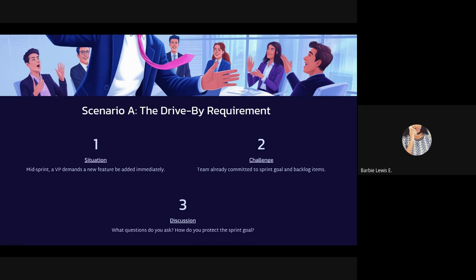One thing I like to do is maybe give them homework as well and say, okay, can you prepare some documentation as to why we're doing this? Or I send them a form that I created myself, a feature request change form. Can you fill this in with all the information that we would need to get this started? Sometimes they don't actually do it because they realize it's not that important. The contents of that form reveal to them that it's not as important as everything else. And I also communicate to them what they would be losing if we were to do that.